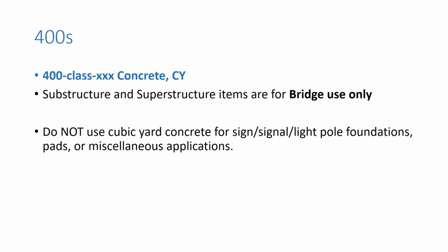And we do not want to use it for any type of sign, signal, or light pole foundation, as these are all paid as part of the sign, signal, or light pole per the specification. So if you have any other miscellaneous applications that you are uncertain about, please work with your district estimates office, and they can help you identify the appropriate item within the specification.